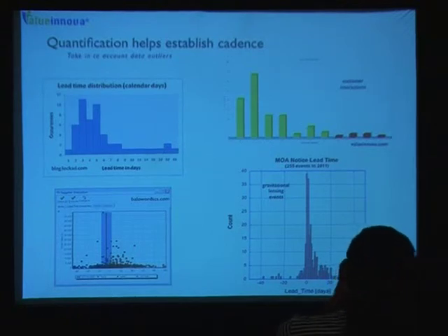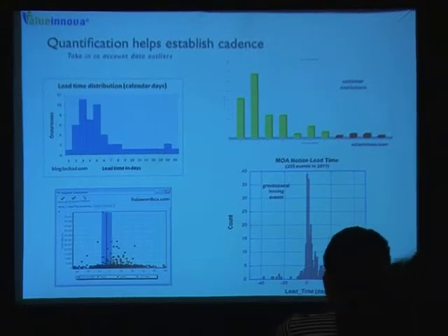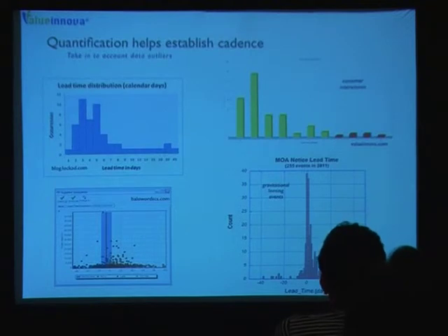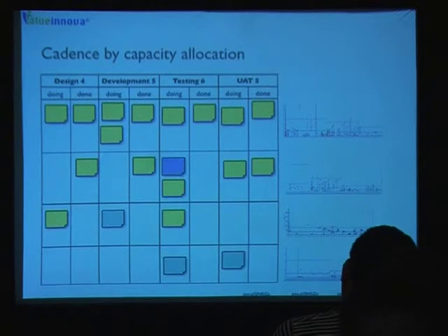So what that means is that we will tell the customer, instead of every 7 days, we will say it's every 9 days. And even though 9 days is longer than 7 days, if we are actually delivering as promised, the customer will love you. And that's huge, because that increases confidence, okay? And at the same time, we are delivering in a way that really works. So what that means is, okay, we can try that out.